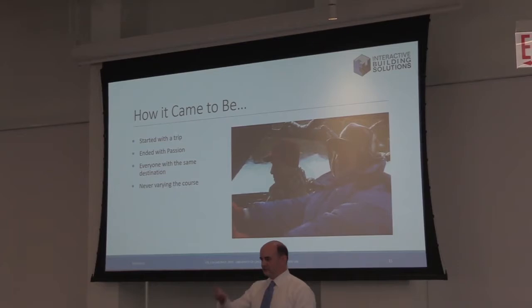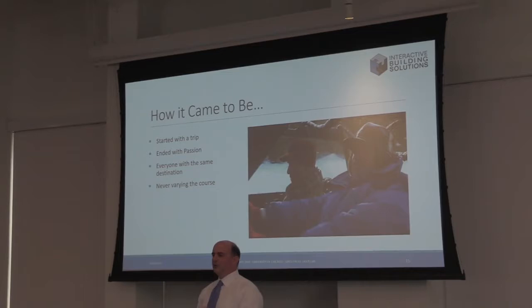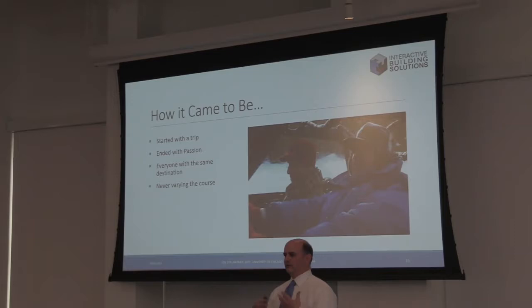The 80 PSI is a brilliant example of this. If someone would have just said, are you sure that's really what you mean? That conversation and 10 years of mess would have been over in about 30 seconds. But for want of that conversation, we built an entire 400,000 square foot building on the wrong specifications and had nowhere easy to fix it, so it took many years of subsequent remediation projects to fix what should have been a 30 second conversation. So having that back and forth really matters, because faculty have no idea what they really need.